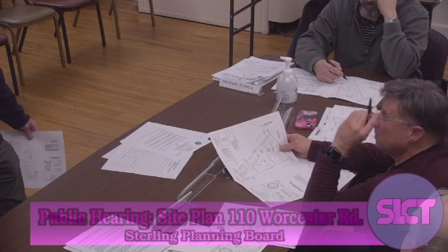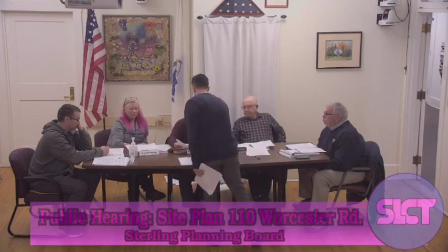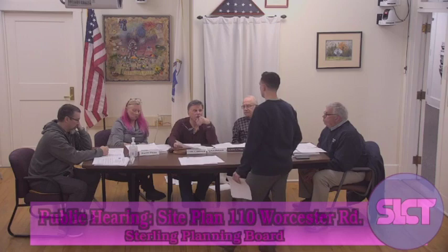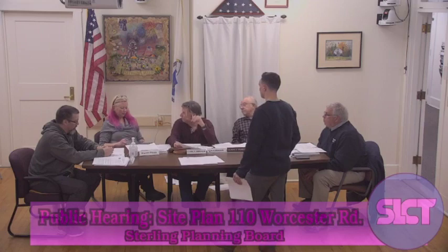Well, how much time do you need? 6 months. I suppose the board can debate if they want. It sounds pretty long to me. We could agree to put this one in to be in conformance with the zoning board and then have extra time on the rest. Yeah, I think we would need it sooner than that. I'd like to see it before summer. You're going to have a lot of traffic as soon as you start. You normally start, what, around May? Your first applications and so forth? It's going to take a little bit of time to find your contractor, get the product and get it installed, so, I don't know, 30 to 60 days? How about split the difference, 3 months?